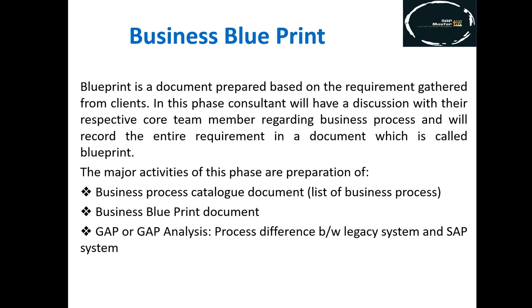And the customization is in another scenario. For customizations, the member has to discuss with our project manager and their core team member. If they both agree, and after getting approval from our project managers, then only the consultant will do the customization process.